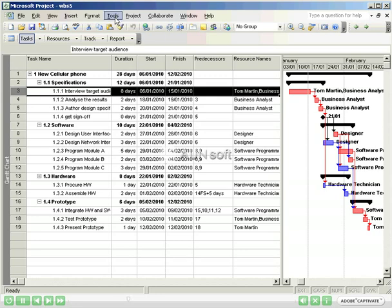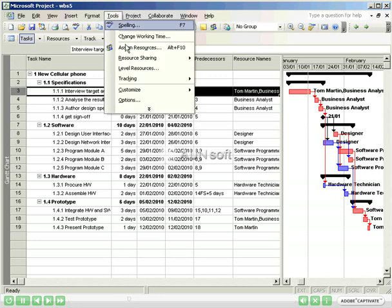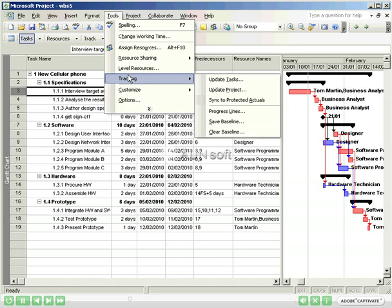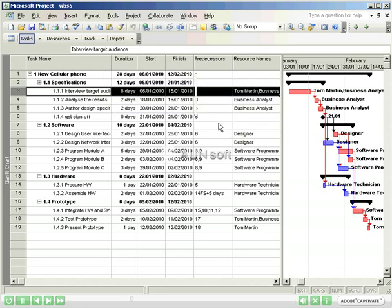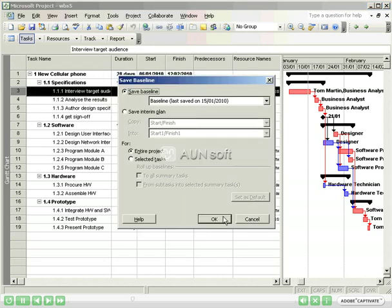To do this, Main Menu, Tools, Tracking, Save a Baseline, OK.